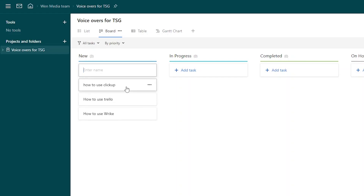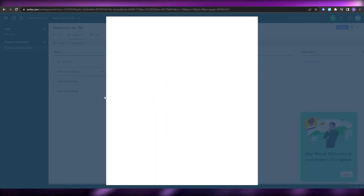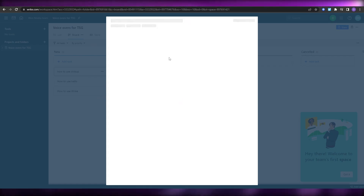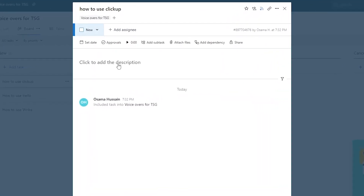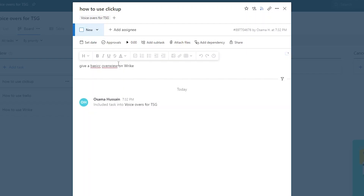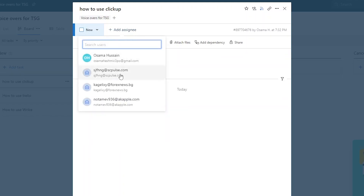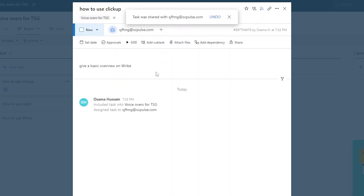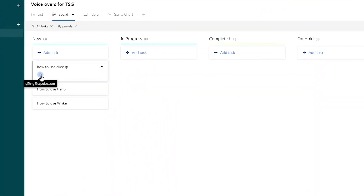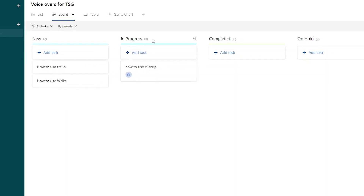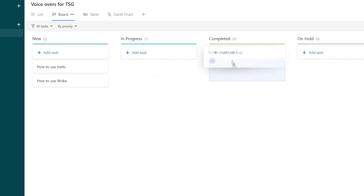You can assign different tasks to different people since you've added team members. When you click on a task a popup appears with more details — you can add an assignee, add a description like 'Give a basic overview on Wrike', and assign it to different people. Once someone takes a task they simply move it to the 'In Progress' bar, indicating that person is working on it, and once completed they move it to done.